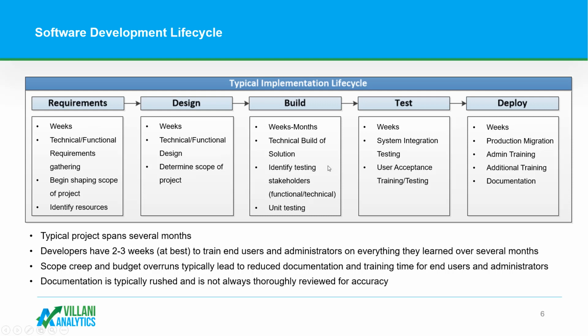But once you get to the testing phase, that's when you're ironing out a lot of the kinks and doing user acceptance testing. That's when you start training the end users, and as a result, you may have a project that's taken several months to build and design, and you're trying to communicate the issues, the knowledge transfer, all the testing, the things you've learned along the way within the last couple weeks of the project.